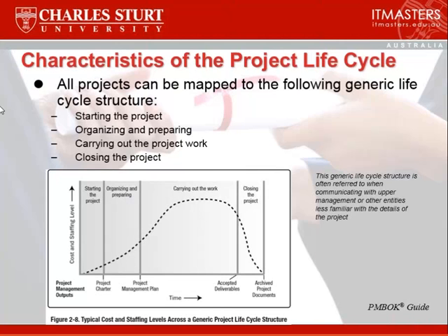Okay, the project life cycle. PMBOK suggests that there are generic life cycle phases. The first one is starting up the project, then organizing and preparing, carrying out the project work, and closing the project. This is displayed here in a diagram, and some of the deliverables from project management and from the technical processes are indicated at the bottom of the diagram.